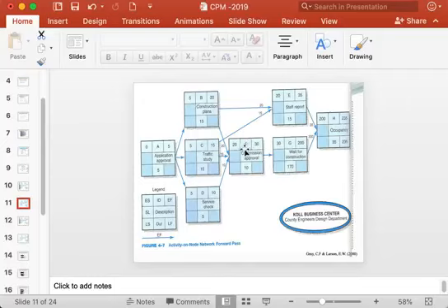Okay, so activity F cannot start after 10 days or 15 days because B will not have finished. B will take 15 more days after completing C. So because this network is showing the precedence of F as B, C and D, and B is taking the longest time, it will have to wait until B is finished.